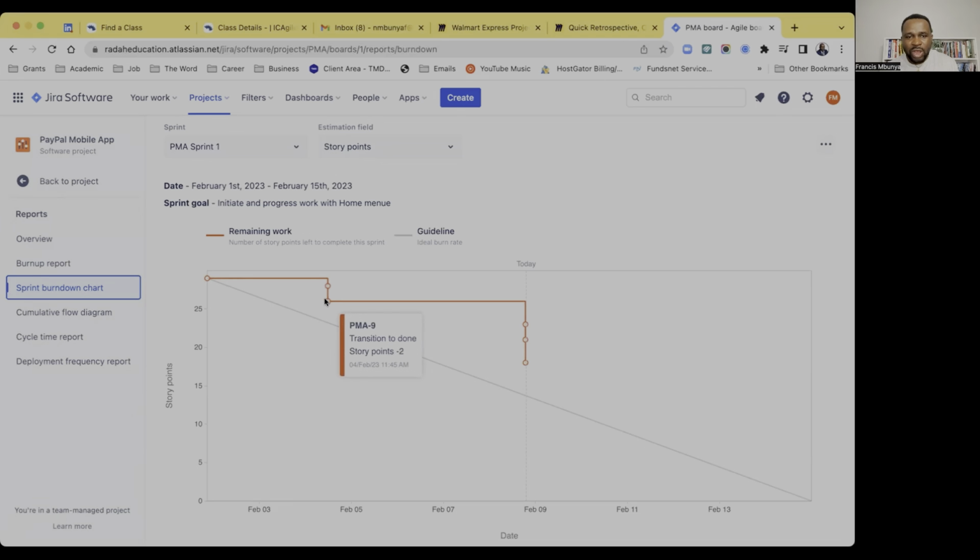But because we have a longer period where we are just building and no story is moved to done, we have a longer, what do we call it, cycle time or lead time? One of them. Cycle. Yes. And some of that also includes non-working days. You see, somewhere here was a weekend, right here. So also non-working days. So you don't expect it to just follow this line gradually.